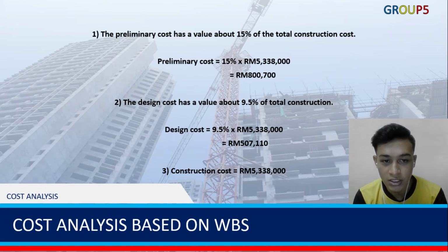Next, the design cost has a value of about 9.5% of the total construction cost. 9.5% was multiplied by 5,338,000 ringgit, and the design cost was 507,110 ringgit. Next, the construction cost is around 5,338,000 ringgit.